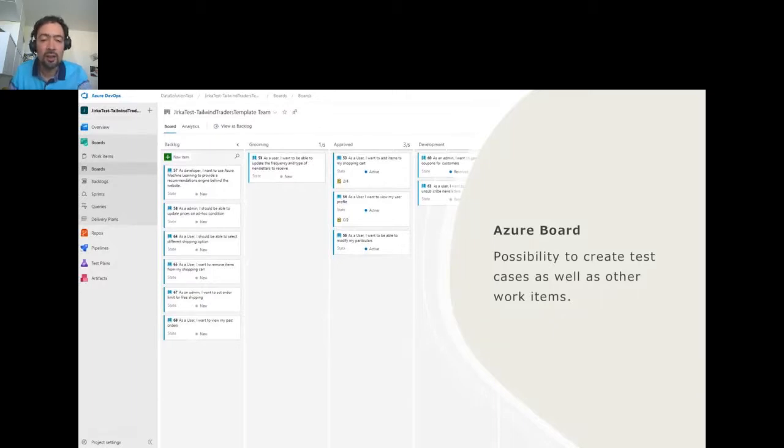As I said as well, you can do all the activities immediately in Azure Boards. You can click on each use case in your Azure Boards on just the three dots, and you can immediately create quick test cases for each user story which you have in your place. You can quickly assign the testers from a pre-created group of testers, and that's it.